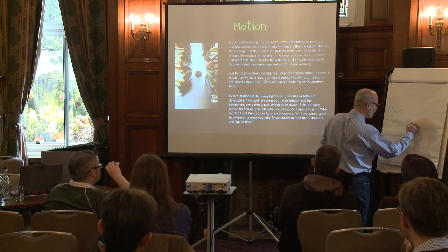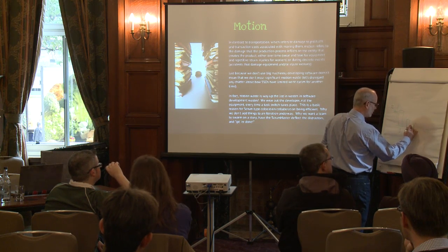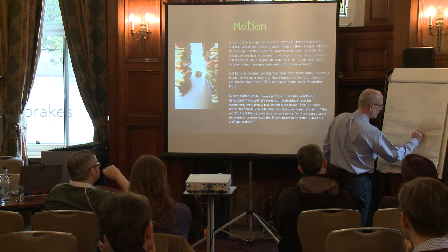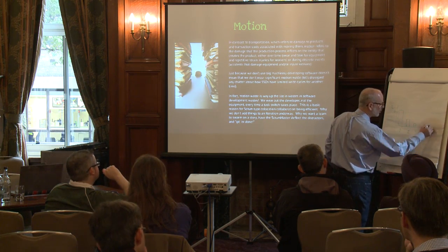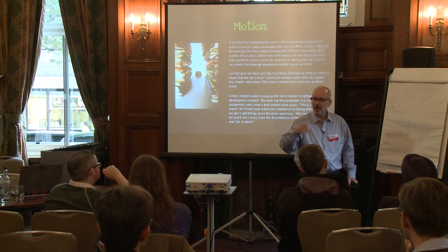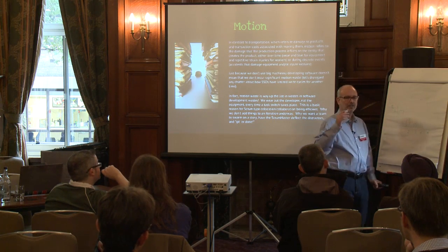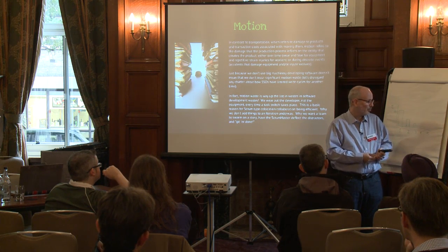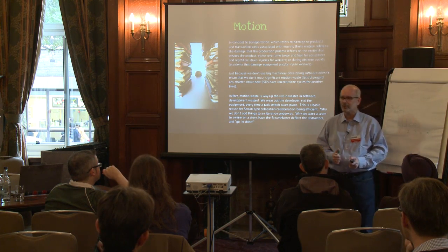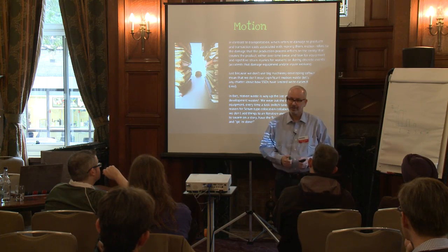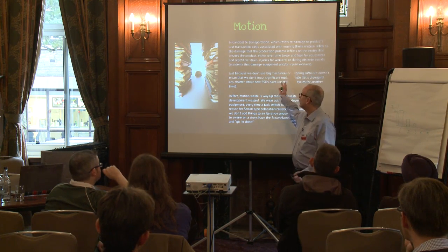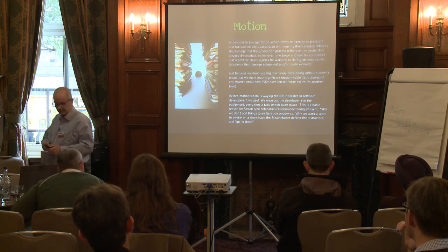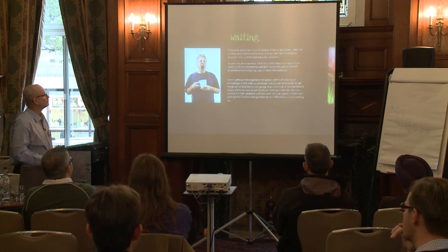When you're starting to work with 3 projects at once, that goes down to some ridiculous level. And I'm not going to even bore you, he said that by 5 projects, the amount of work you would get done on any of the projects is negligible. And the certainty that you're going to get something done at a particular time is kind of random, right? So motion waste is a serious, serious problem. We've got to move along here.